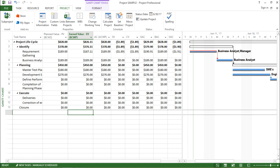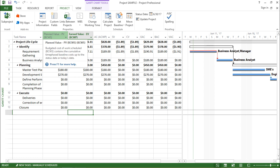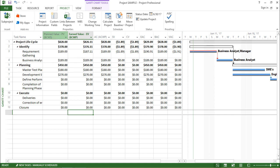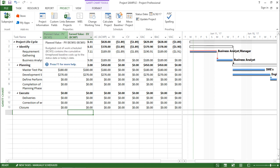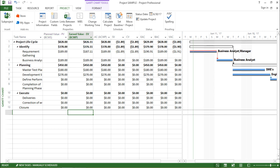Let me start with the very first column — it says Planned Value. When I hover over the Planned Value column, a tooltip displays: 'Budgeted Cost of Work Scheduled — contains the cumulative time-phased baseline cost up to the status date or today's date.' So basically it updates up to the status date or today's date, and that is the reason I have updated the project.